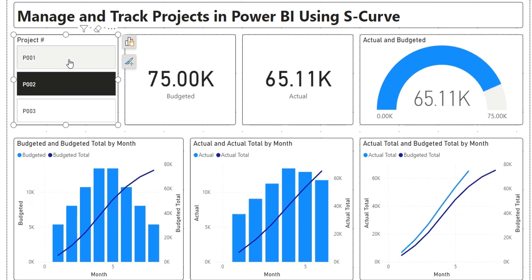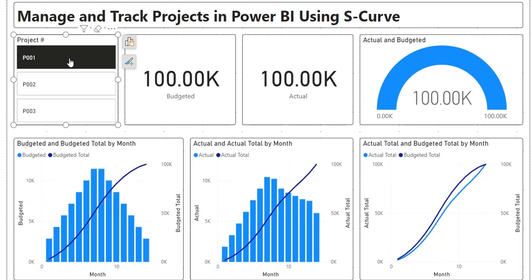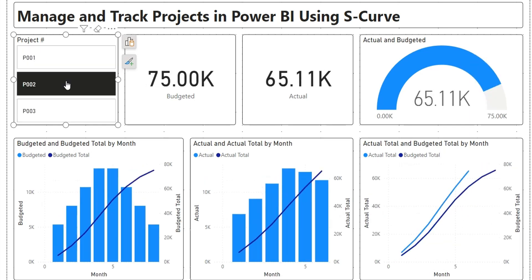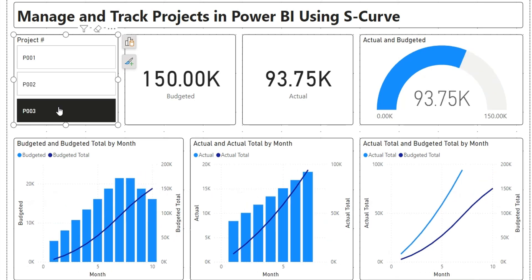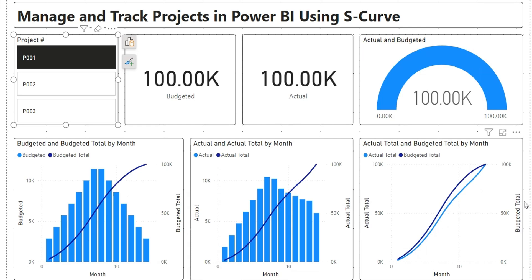An S-curve represents the cumulative work accomplished over time. It's a valuable tool in project management, offering insights into progress, potential delays, and resource allocation.